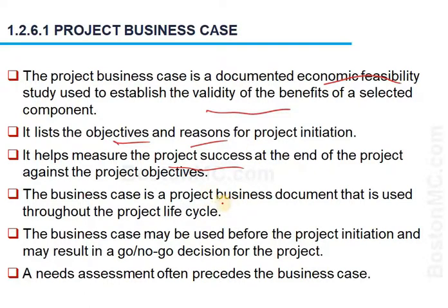The business case is used throughout the project lifecycle to continue validating the project for viability. It's also used before the project initiation for the go, no go decision, and as we go along to see if the business case is holding through and whether the project needs to continue or not.